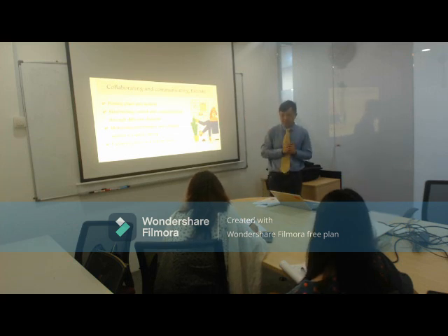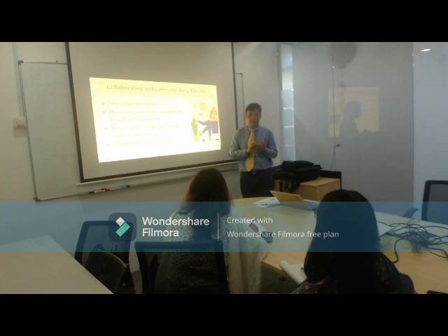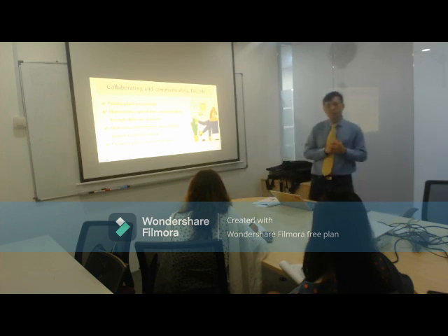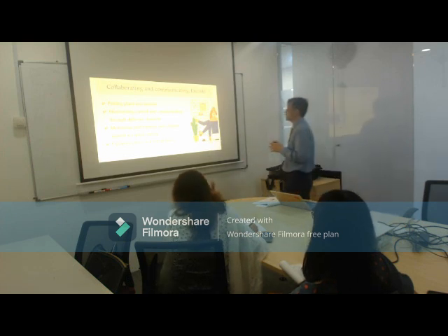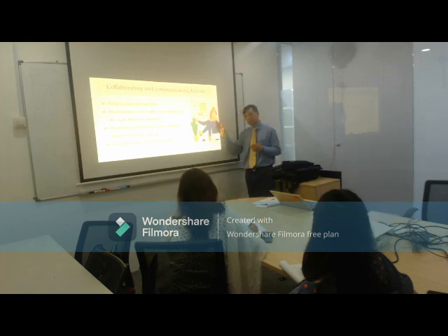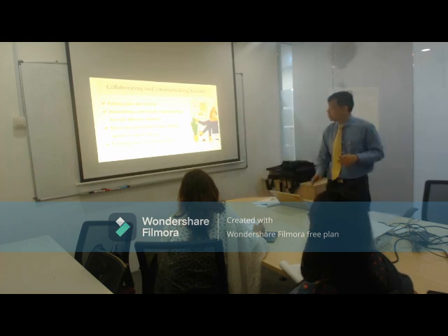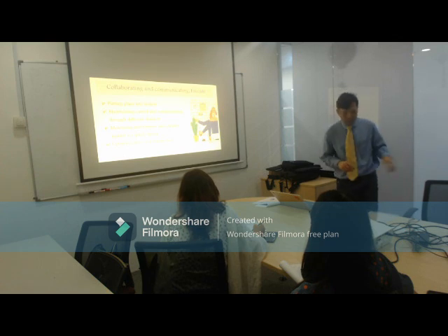Problem is what? What if a person got sick? The painter is sick. Then they have to update his plan to see what else I'm going to do. Why is that important? Because remember I was telling you, she has to achieve all this painting done before Chinese New Year. Right? So she has to make sure that she has all the plans, what she's going to do if these things happen and all that. Just make sure that everything is done by Chinese New Year, before Chinese New Year. Okay, so those are the examples that we have for the painters.